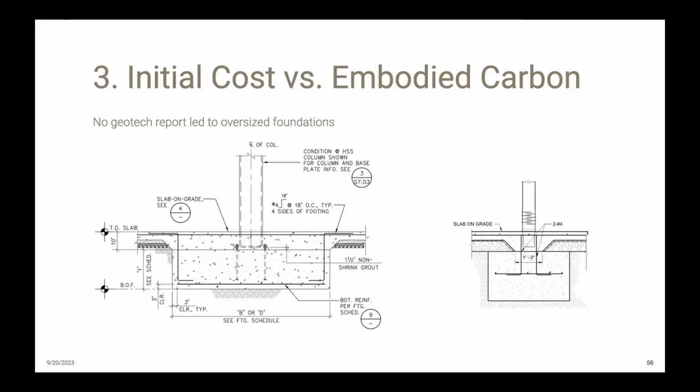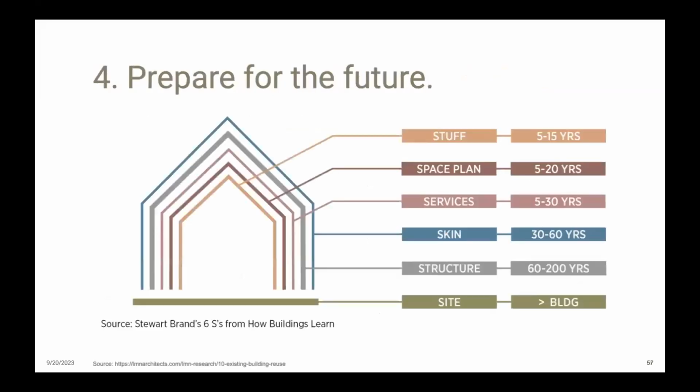And there weren't very many foundations on this project, so it probably didn't result in a huge amount of carbon here. But if we were to have this same thing happen again and again on multiple renovation projects, it would add up to a lot of carbon. Plus, the modest savings in upfront costs was probably negated by the money that the owner spent during construction for extra concrete and excavation required for the larger foundations. Next.